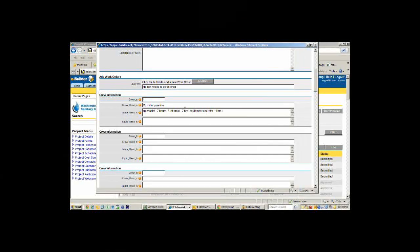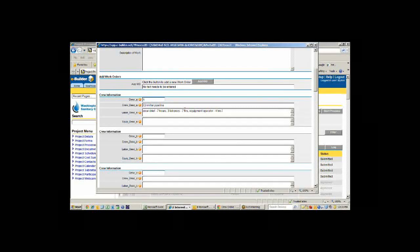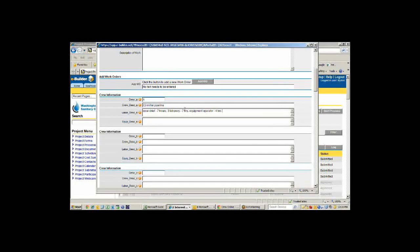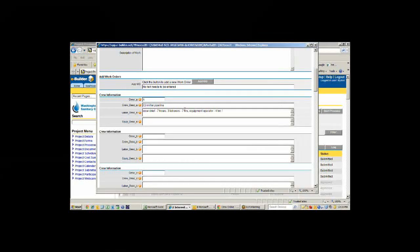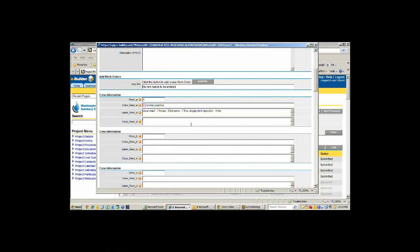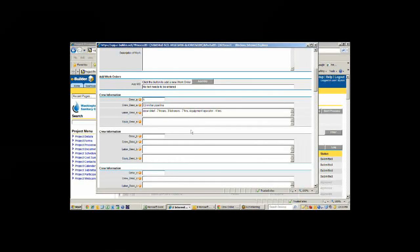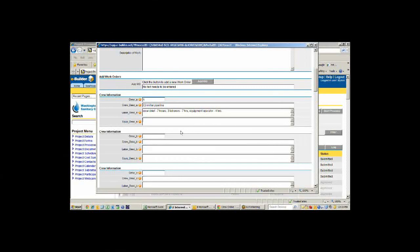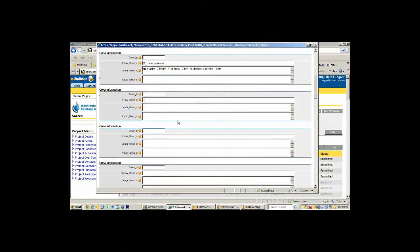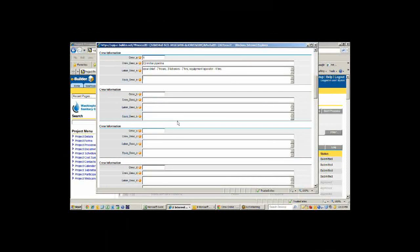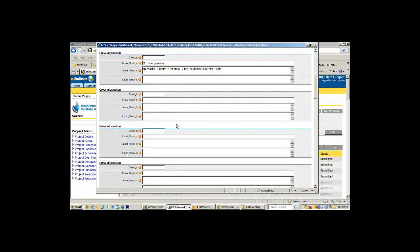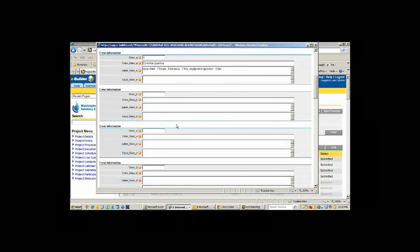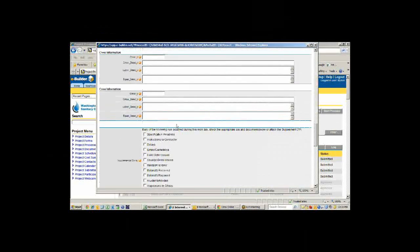We track both the labor and the equipment. In the equipment they would write in how many trucks are there, what types of trucks, whether it's a vacuum truck or a dump truck or a crewed state bed or whatever. They can do this for each crew that's on the site because you may have multiple crews working in multiple locations if it's a sewer contract. We have the ability to enter up to 12 different crews.